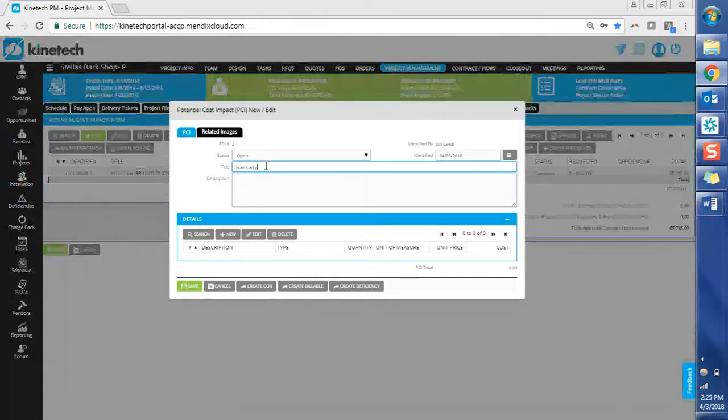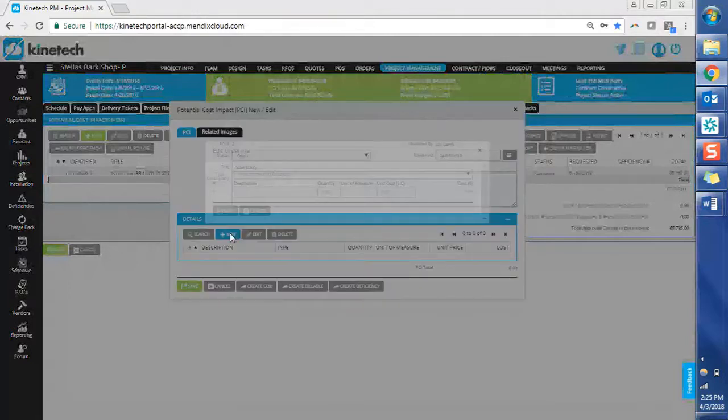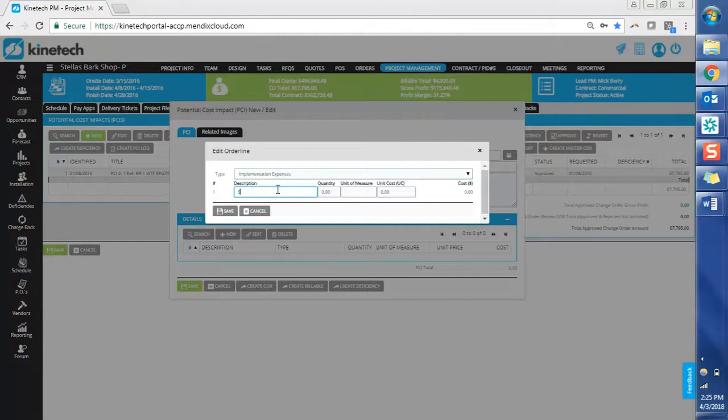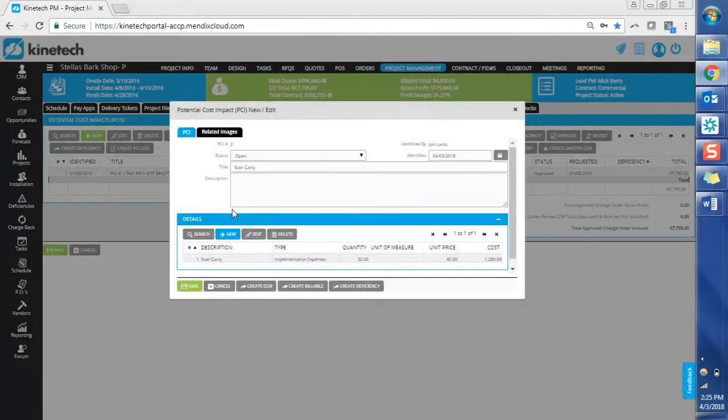We're not sure who was responsible to make sure that that freight elevator was big enough, but we know that it's going to be an extra cost. And it's going to be some extra hours here. And we're just going to say it's maybe 4 guys, extra day's work at $40 an hour. So let's go for over $1,000 here. We don't know.